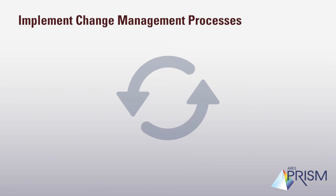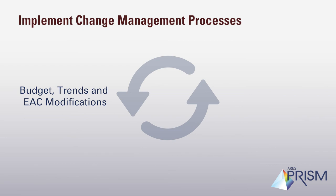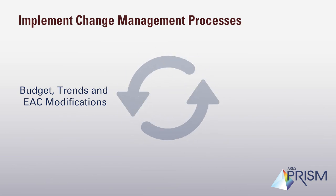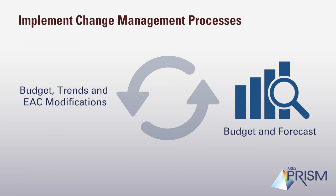Implement Change Management Processes: Project changes can be budget changes, trends, or EAC modifications. With Prism, you can implement change management processes to maintain control of scope and cost. Once the changes get entered into the Prism Change Module, they can easily be calculated in the Prism Cost Module to hit the budget and forecast.